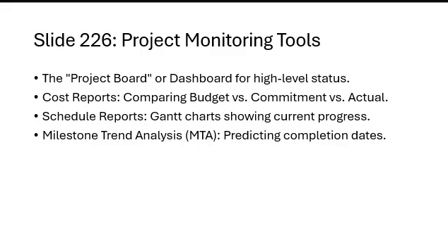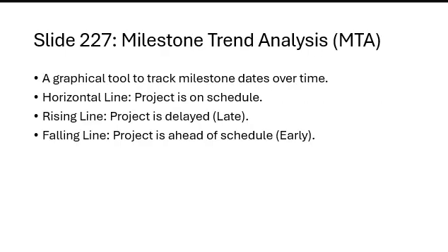Project monitoring tools: we use the project boards, a dashboard that shows high-level project status. The cost reports compare budget, commitment, and actual spending. Schedule reports display Gantt charts of progress. Milestone trend analysis predicts completion dates. So the monitoring tools provide visibility into project performance.